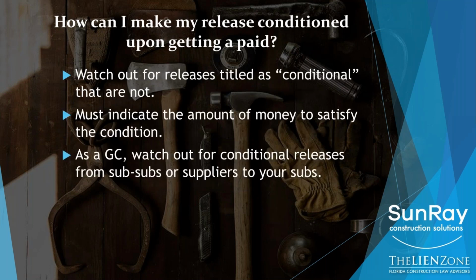Watch out for releases that are titled conditional, but are not. Sometimes we see a release that says conditional partial release, but then when you read the document, there are no conditions in it. So it needs to specifically say what the condition is, which is you actually receiving the money. The fact that the title says conditional, but the body doesn't, means it's not conditional. And you must indicate the amount of money that you're actually expecting to receive, because if you put in $10 as the condition, well, if you get $10, then the condition's satisfied. So you need to specifically say, if you're expecting a $25,000 check, that the condition of this release is when you receive paid funds of $25,000.